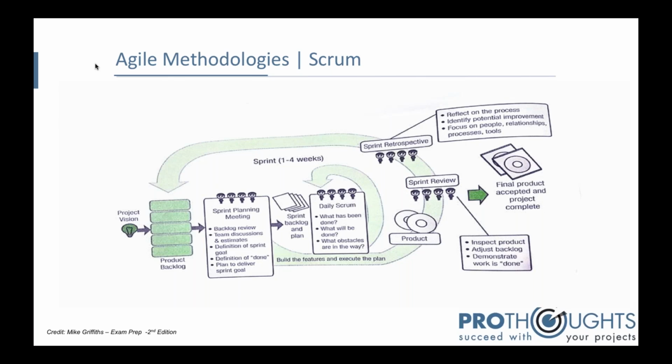And there are different things that you reflect on during the entire process. For example, every day in this 2 to 4 weeks, you have a daily Scrum meeting, a stand-up 15 minutes meeting, not more than that. Okay, and you have reviews at the end, which are very important.